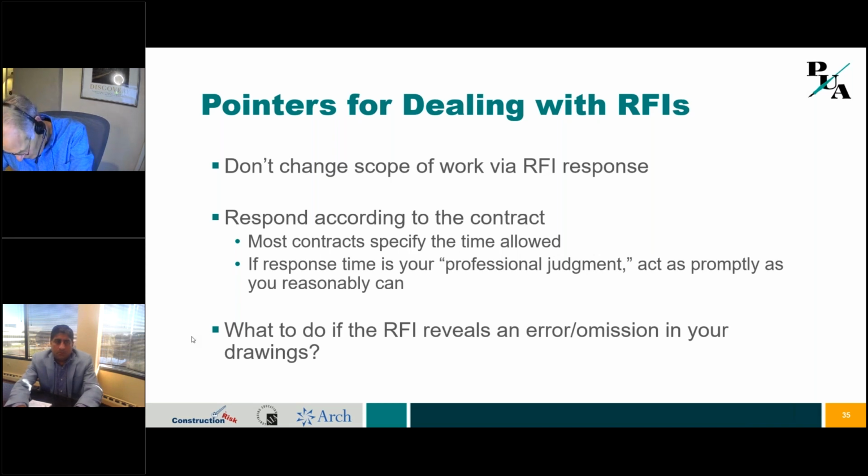So the owner told the contractor, but the work didn't stop. The contractor kept on doing it. Three days later, bricks are still falling. Designer comes back to me, what should we do? I said, well, I think at this stage, you need to tell the contractor, stop the work. I said, now, you're going to have a claim. Contractor's going to come in and say, oh, he delayed my work, blah, blah, blah.